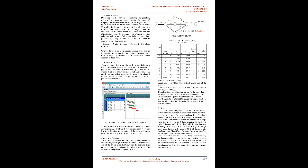Siemens' algorithm is defined as follows. Step 1: Estimate activity durations on the network and perform CPM calculations based on the normal duration of activities. Step 2: For each path, compute the necessary time reduction (TR) and determine which ones are not shortened enough (TR > 0). Step 3: For each activity on at least one of the paths from Step 2, compute the cost slope C and the reducible time TI. Step 4: Compute the effective cost slope for the activities of Step 3. Step 5: Among paths with maximum necessary time reduction, select the one with the least effective cost slope. If more than one activity meets this condition, decide using the following criteria: A) choose the activity occurring on the most not-shortened-enough paths; B) choose the activity with the largest necessary reduction time; C) randomly choose one of the activities.